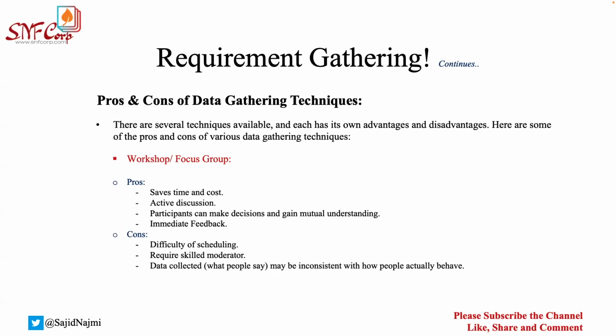If someone is talking and you don't want to stop them, but you have to, there are different ways of doing it. Just stop them and tell them, okay, you know what, that's a really great point. I really learned a lot, but it needs sufficient time to discuss. It would not be justified, and we would not respect this discussion, if we try to close it now. Let me have a separate session for you guys to discuss this point specifically. I'm going to set up one more meeting, and you let me know who would like to be part of those discussions. Let's have a separate session and discuss in detail. This sounds professional, so people will know that you have stopped them, but they will not feel bad because you're not being rude.